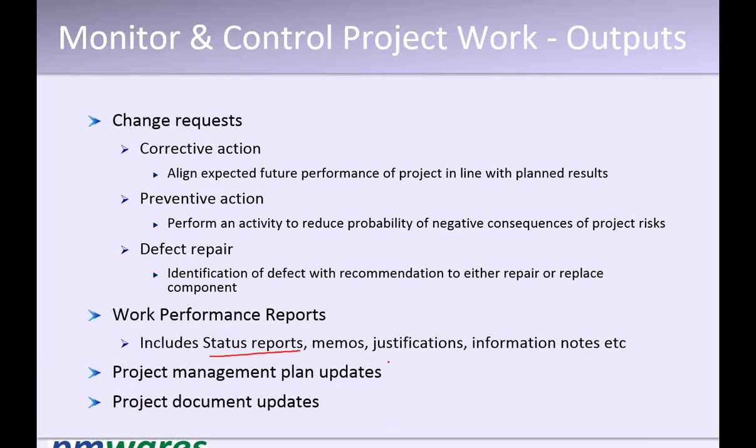Your status report, if there are delays, the justification for delays or getting early, whatever the variance is coming, justification for that variance basically, either negative or positive. Basically, the idea is a presentable data which a stakeholder can understand, or he gets the information on what the process is. That is the work performance report. Right? It's okay?